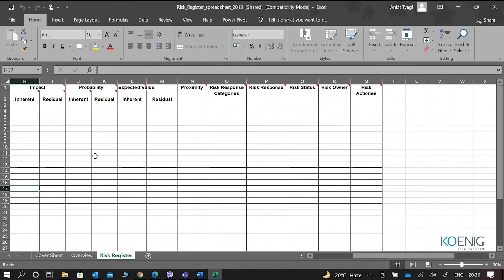Similarly, we also track probability — the inherent probability and the residual probability after the controls have been defined and after we have put in a risk response plan. There is also expected value before and after. So after we have identified the response plans, what is the residual value that we get, and what was the value before.